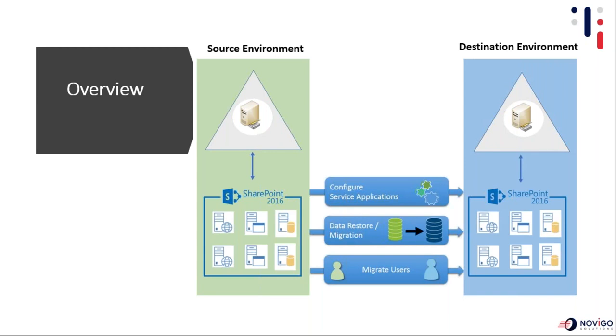You need to deploy all your custom solutions and custom configurations, let it be your WSP packages, your timer jobs, or including your user profile custom properties if you have to, or any web.config changes, any file system level changes that you may have done, like blob cache, etc. You need to mount the databases to the respective web applications, and you need to migrate the users from the old domain to the new domain. So this is a high level overview of the entire migration approach.